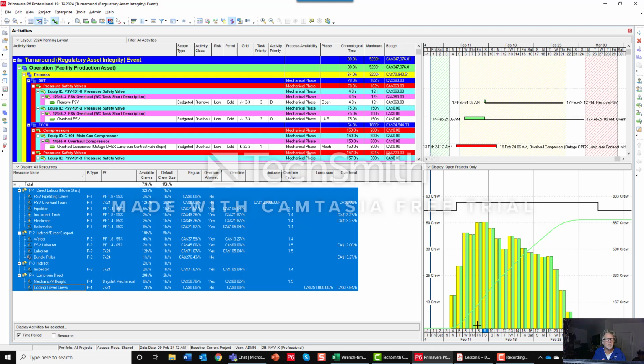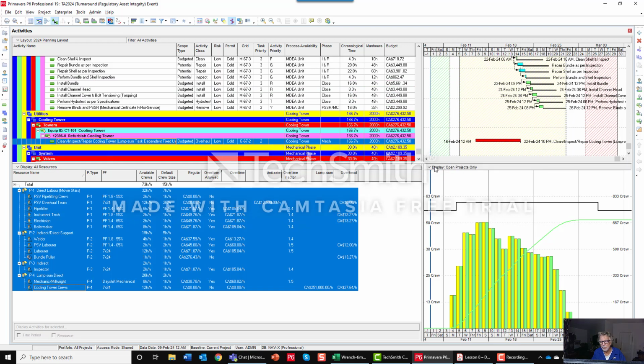So we're not going to measure tool time for every job. We're going to measure the tool time by shift or by day over a 24-hour period. From that, we need to have what did we plan to do in this 24-hour period? Well, you'll see here in P6 that I've highlighted all the work that's resources going to be deployed today. I have this time period turned on. Remember, this time period is available when we have this show all projects turned off. If you have this turned on, this down here will be grayed out. So you want to make sure that you show all projects.